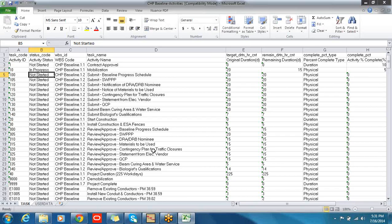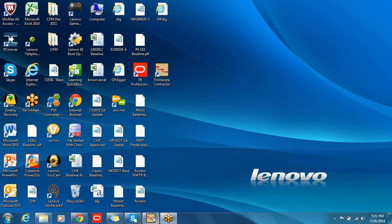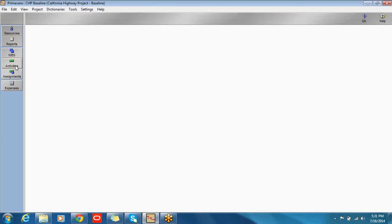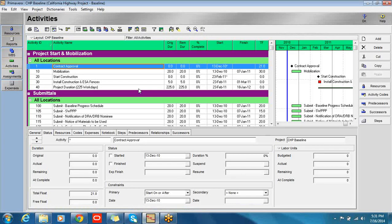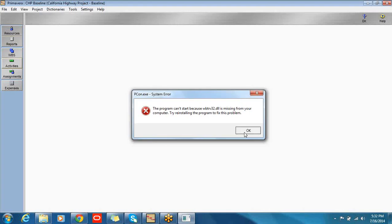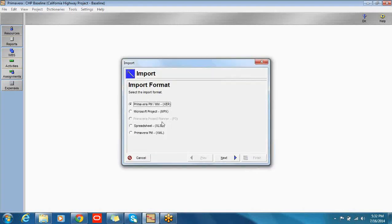I've shown it as in progress, and that's it. We need to save the file and close it. I'm going to close Excel altogether, but that's not necessary. We go back to the program — the schedule must still be open that we're planning to modify. I go to File, Import. Again, ignoring this little message we've been getting recently. Click on Spreadsheet, Next.